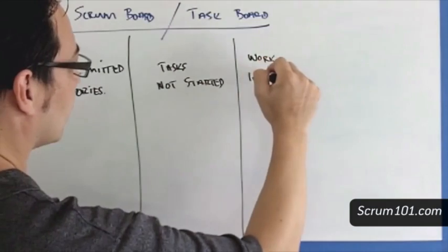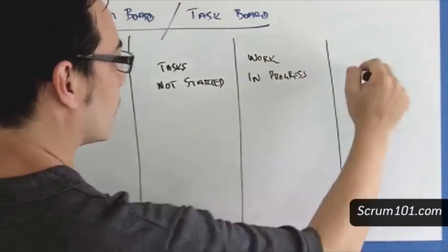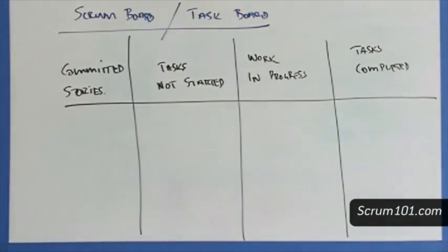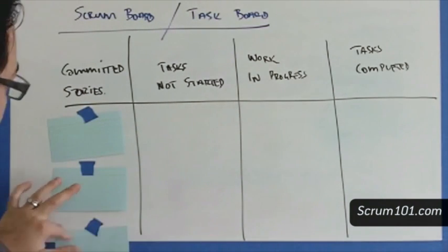At the start of the sprint, during Sprint Planning Meeting Part 1, the team will forecast how much work they think they can likely achieve. And they will then take those user stories and move them onto the task board, like this.